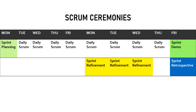This slide should give you a visual representation of when each of these events will happen during the Sprint. As we discussed earlier, a Sprint is a 2-week time box excluding the weekends. A regular Sprint typically consists of 10 working days, as you see in the slide.